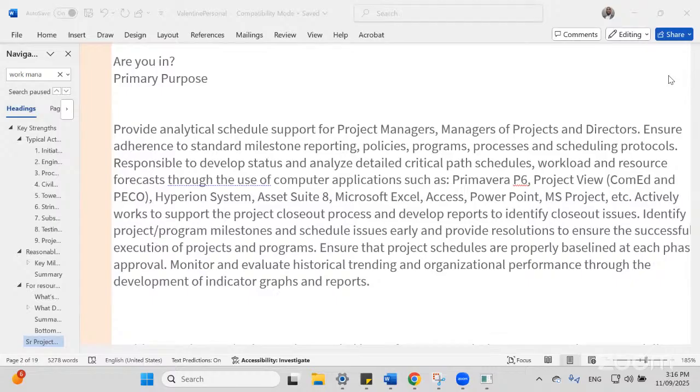So what are the reports they are expecting with reference to milestones? Whether we are ahead or behind the milestone? If we are behind, how can we mitigate that delay? Then what are the precautions we need to take?